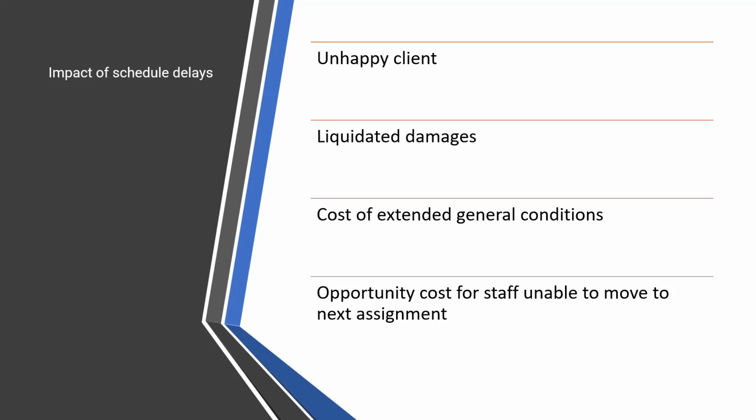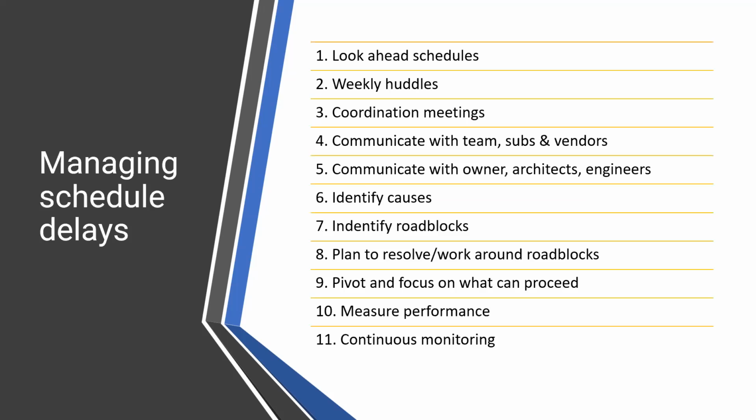So we're not just going off a schedule that is more of a prediction at the beginning of the job on how things should go. Through these five connected conversations, we're taking it and making it real week by week. And also looking into the future, 5 weeks from now, to make sure that we can identify and mitigate risk to the schedule.